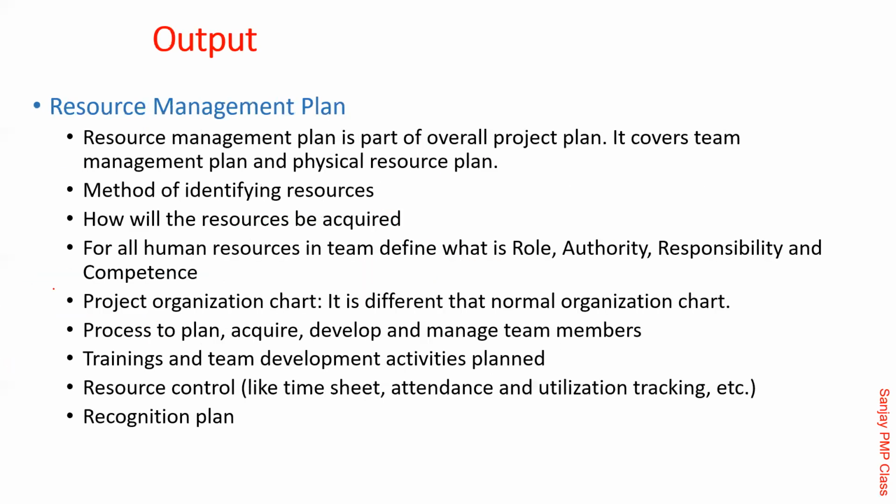Meetings, obviously, for planning. Output: this one is common, no? Resource management plan. How are you going to identify the resources? Will you conduct interviews? Will you use certain evaluation criteria? Will you prioritize communication, which is very important for this role, or technology? What tools are you going to use? Will you take them on contract, or on role? All that. Also the definition of the project organization structure, as I told you, the OBS or whatever, and how you are going to acquire the people and so on.